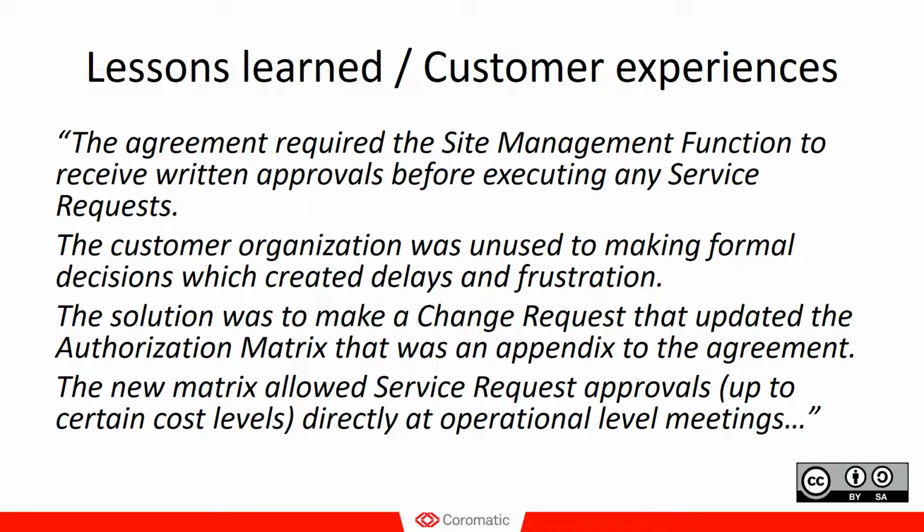So, lessons learned. In this case, it's a real example from an agreement that required the site management function to receive written approvals by the site owner before executing any service requests. So every service request, even though they were included in the contract scope, needed written approval by the site owner. The reason for this was that the site owner was extremely risk averse and did not want to have things being done to the site without the owner being informed and pre-approving these.